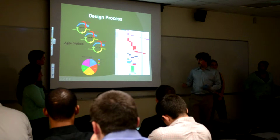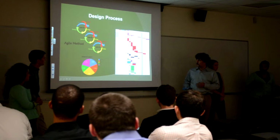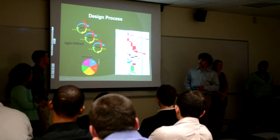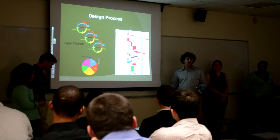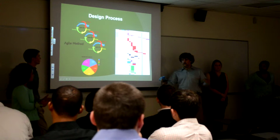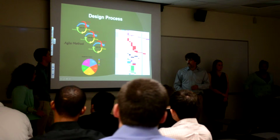As we formed a group, we needed some direction and some tasks that we were going to complete. So we created a Gantt chart, so it's more like a waterfall style. Quickly this became inefficient because things took much longer than we thought they would, and we switched over to the agile method, and we went with about 1 week sprints, sometimes a little bit longer if need be. We met every week, and during class time we worked together. We had separate groups within our project team. For example, these 2 were on Android. She did all the hardware. He did all the back-end stuff and a lot of the design and the UI.